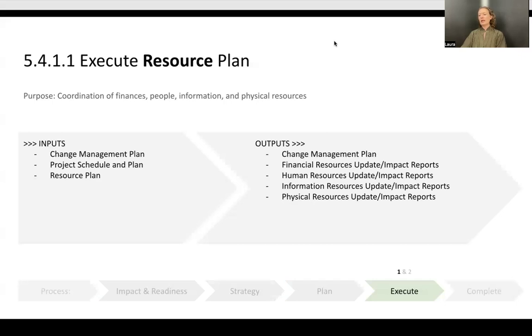Human resource management is a strategic function for identifying the most effective use of people. Expected benefits can be delayed, diminished, or never realized if the proper human resources are not available when they are needed to deliver and embed the change. Resource availability conflicts may occur due to competing priorities, coinciding tasks, or unavoidable circumstances. These conflicts may require rescheduling activities and could result in changes in resource requirements for current or subsequent activities.